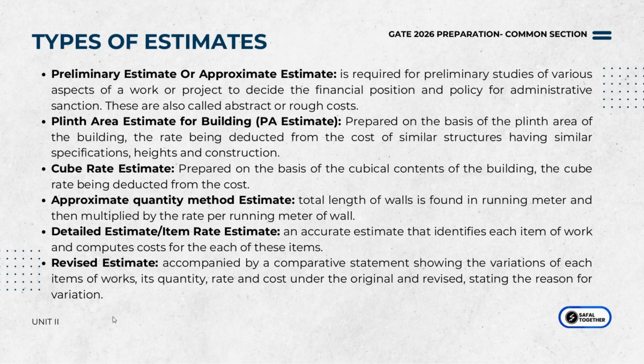Okay, so you look at the preliminary estimate, and then whenever you get new information or whenever there's a condition change, say for example a particular material's cost has risen in the market, you automatically replace it. Okay, and then you state the reason for why you're replacing or why you're varying it, and then you add it in. Okay, so whenever new data becomes available or new conditions emerge, you automatically change your estimates, and then you reflect a more accurate picture of what's going to be the expenditure, and it'll help you guide your future actions.